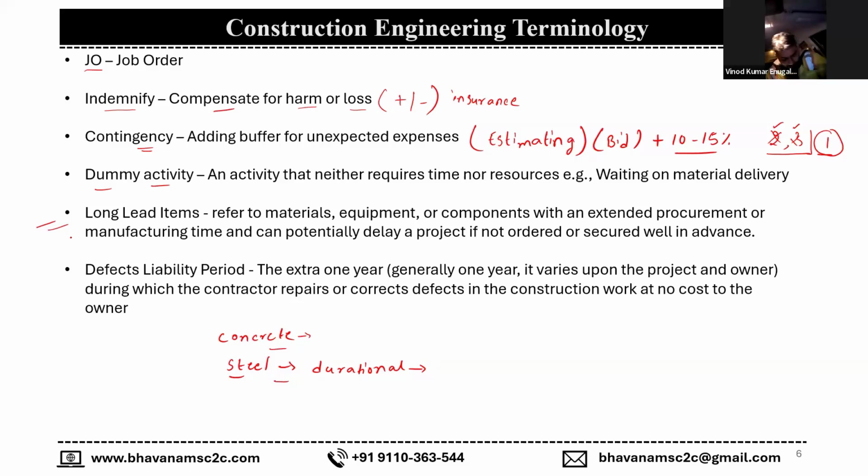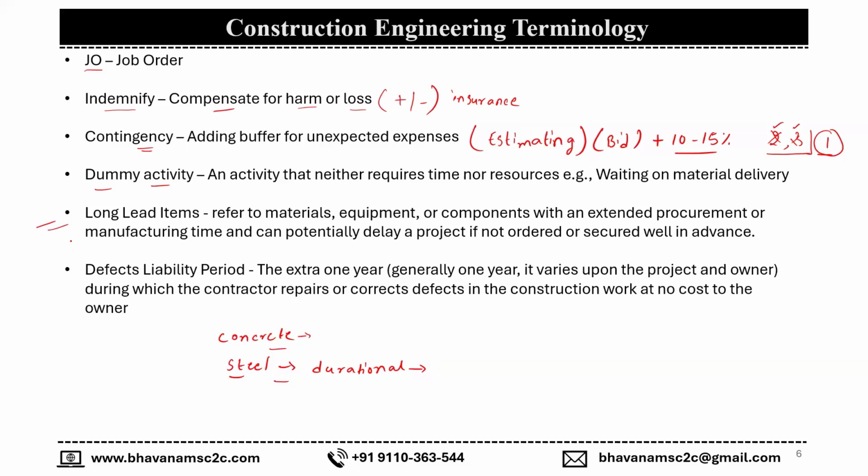And coming to long lead items, for most projects you can anticipate or expect certain long lead items. What a long lead item refers to is that the manufacturing of that particular product or thing may take too much time.